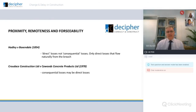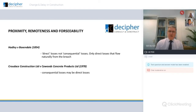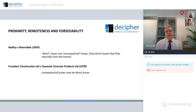Contrast that with the more recent case of Crudas versus Corwards. Corwards supplied concrete products to site and had an exclusion clause in their terms saying they weren't liable for any consequential losses arising from late delivery. However, it was held in the Court of Appeal that their late delivery could not be classed as a consequential loss because they supplied regularly to the construction industry — they would have foreseen that if they delivered products late, the contractor would actually incur the direct costs of standing time for men, resources and plant. So those were classed as direct losses, and Crudas was successful with its claim.